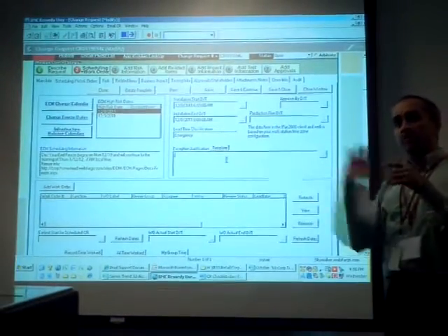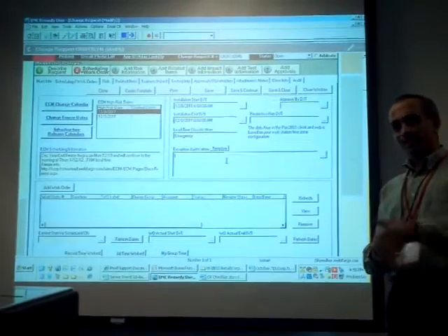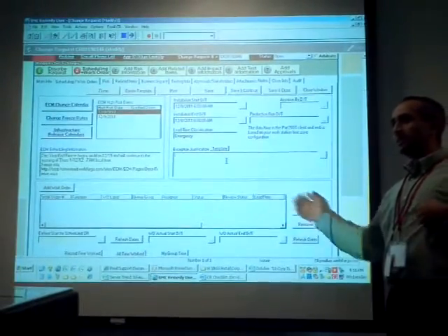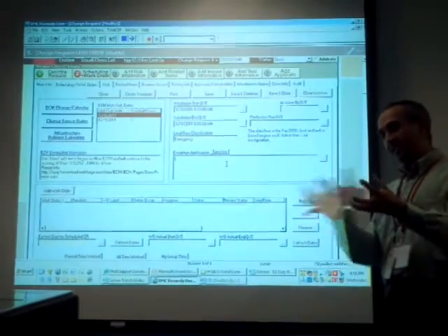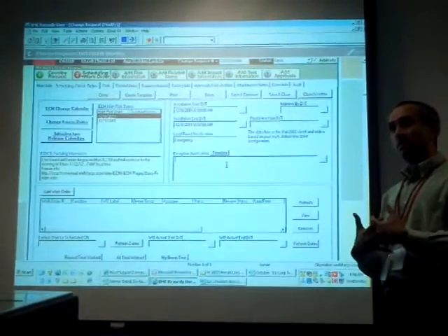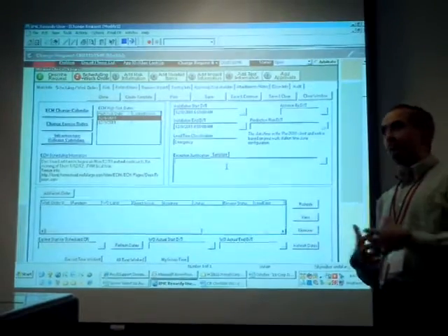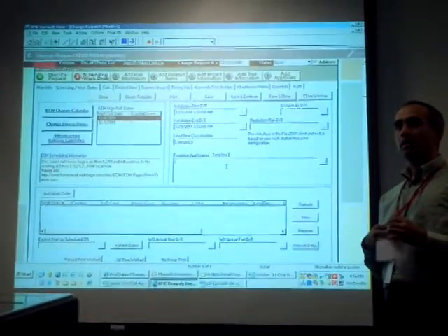So that rule of in the future doesn't apply if... Or somebody else is going to have to do it on their shift. Yeah, exactly. Or if you have many teams who are going to coordinate that change with you, like VE will be involved, storage will be involved, you've got to add those work orders here.